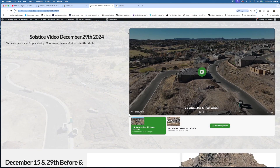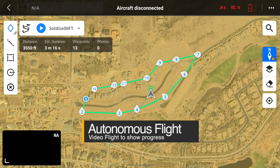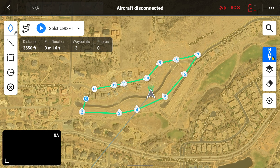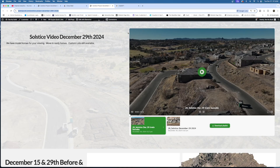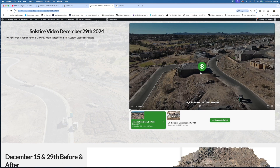Since we started this project we have been doing video flights every other week since basically January of 2023 — so that's a lot of data and a lot of different types of flights. Clients really like video flights. We actually set up autonomous flights using MapPilot Pro initially, and then switched to DJI Pilot 2. In the middle of the project we did change tools, but we created several autonomous flight paths that the drone could fly each and every visit.